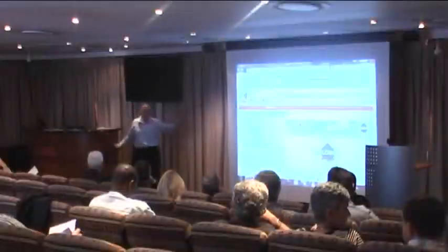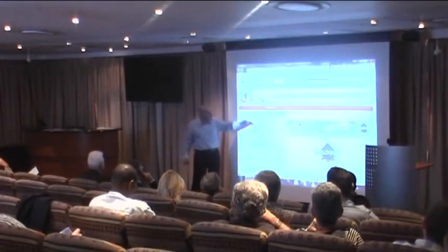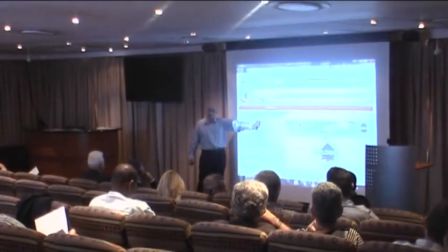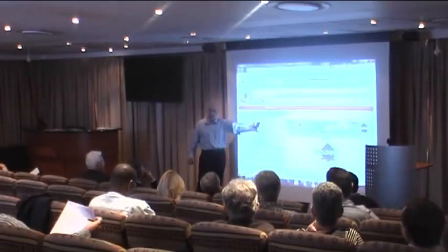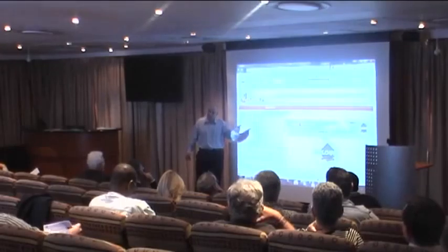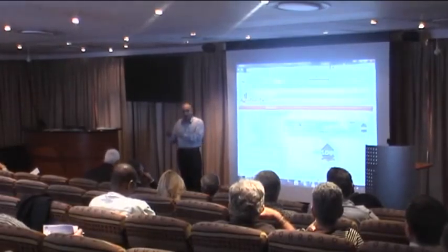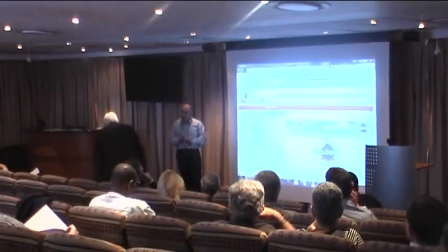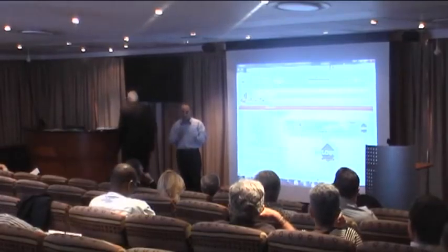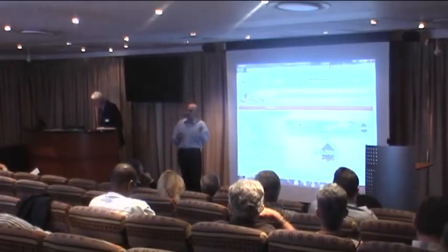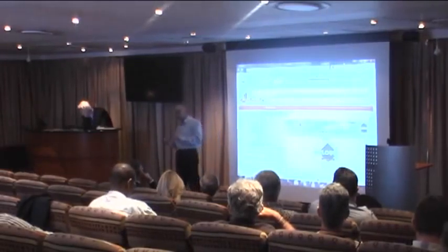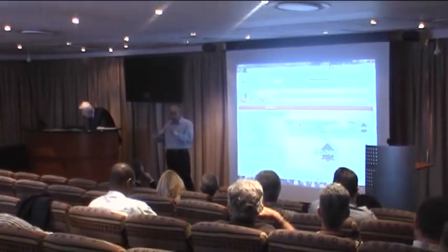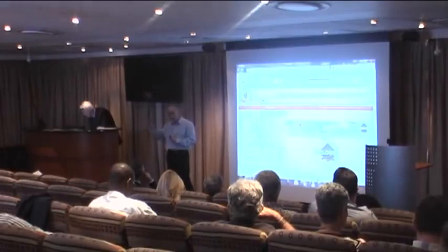So I never mentioned one of the key things, the power really lying in that feasibility program, which is the sensitivity. Goal seeking, what if, changing. Because you will feed in your inputs, you'll get a set of results, and 9 times out of 10, it's not the results that you're actually looking for. So we now start tweaking. What happens if I change my land, I change rentals, I change cap rates, I change building costs? How sensitive is it to different changes? And it produces those reports for you.